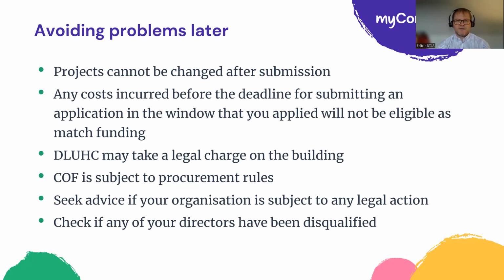Projects can't be changed after submission. So yeah, really important that you get everything you have into your existing application form. Any costs incurred before the deadline for submitting the application window will not be eligible. So yeah, don't spend your match. I think that's really critical.